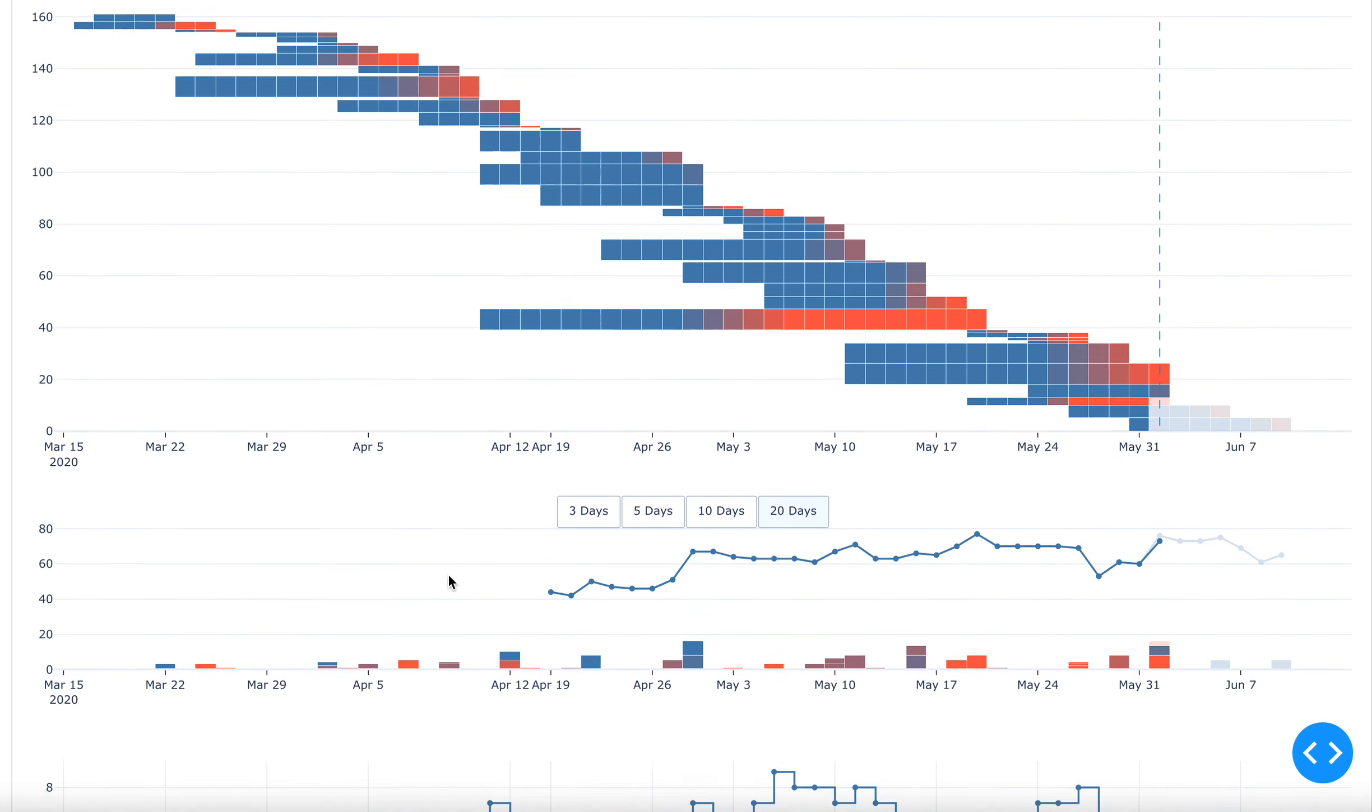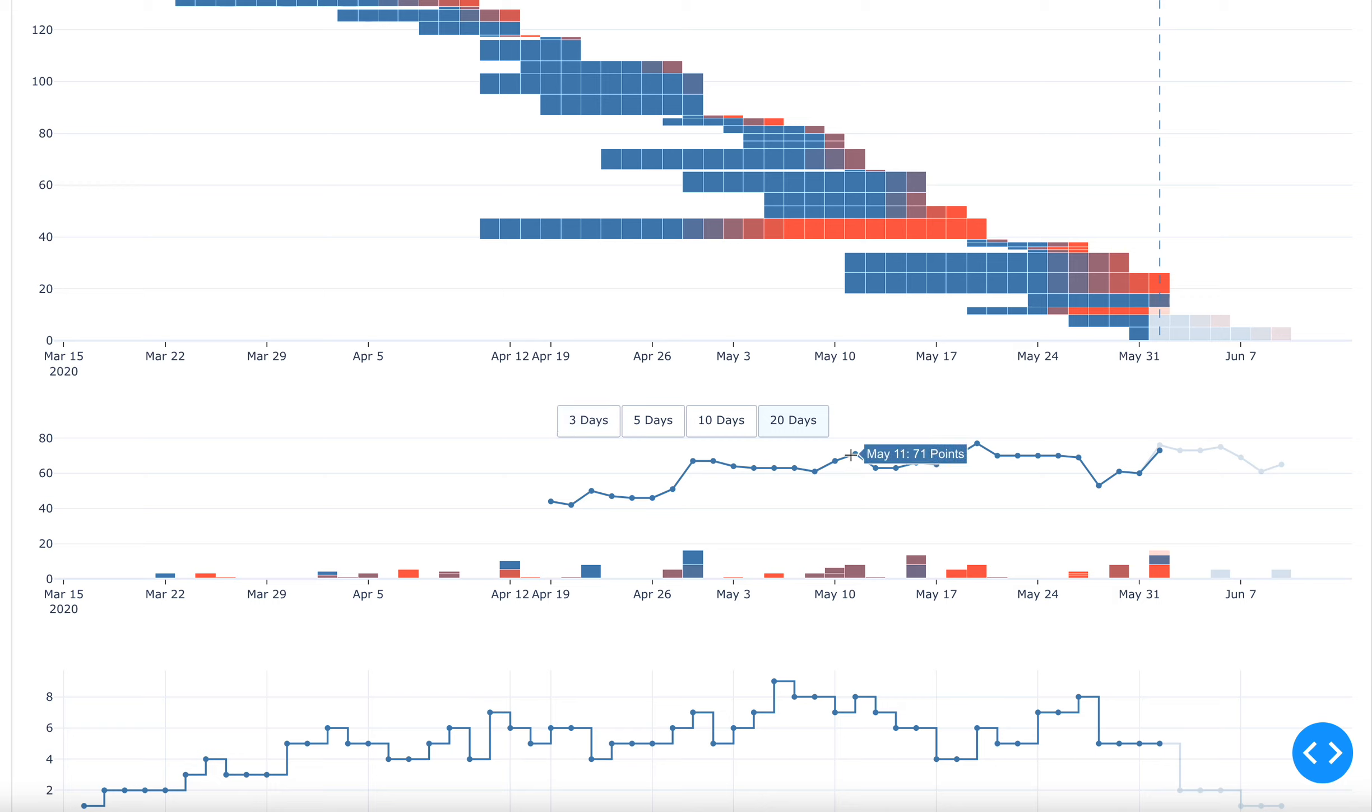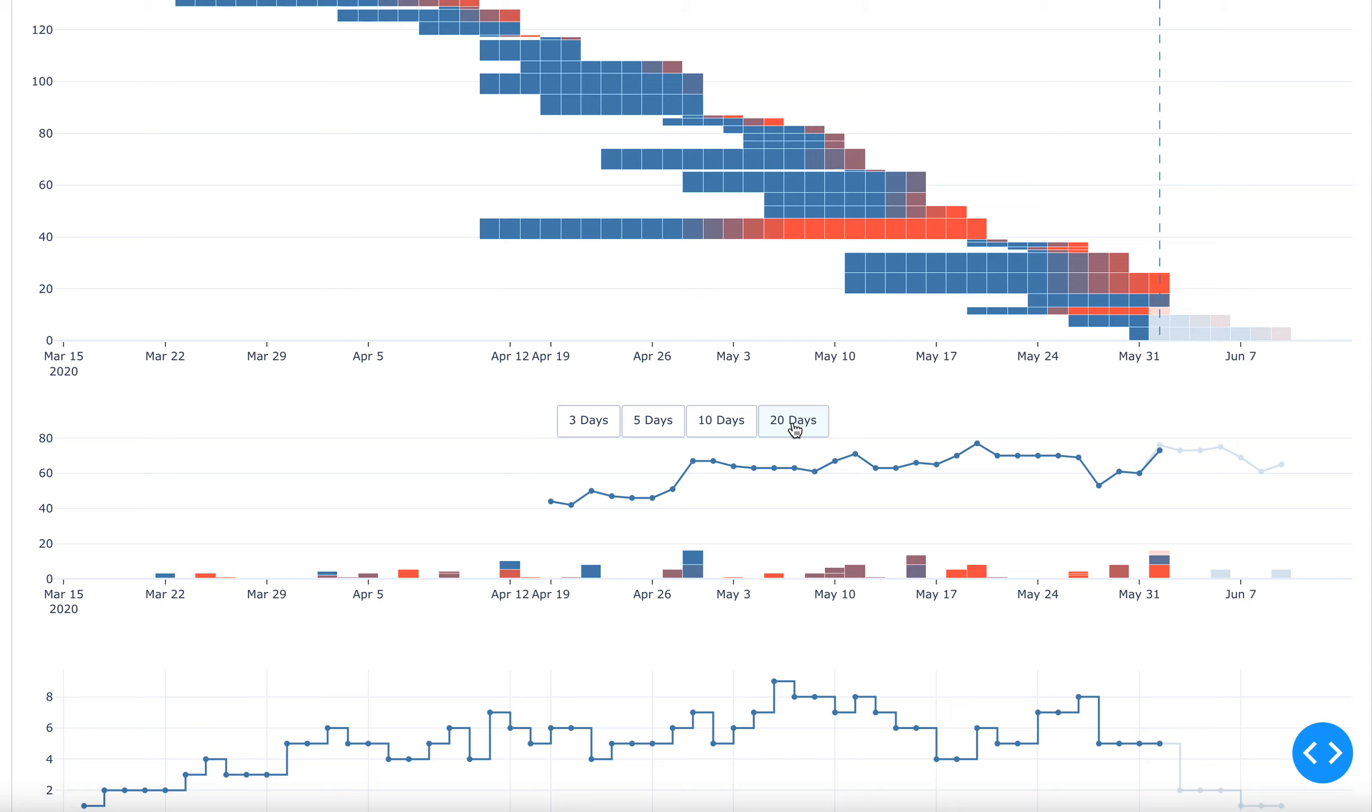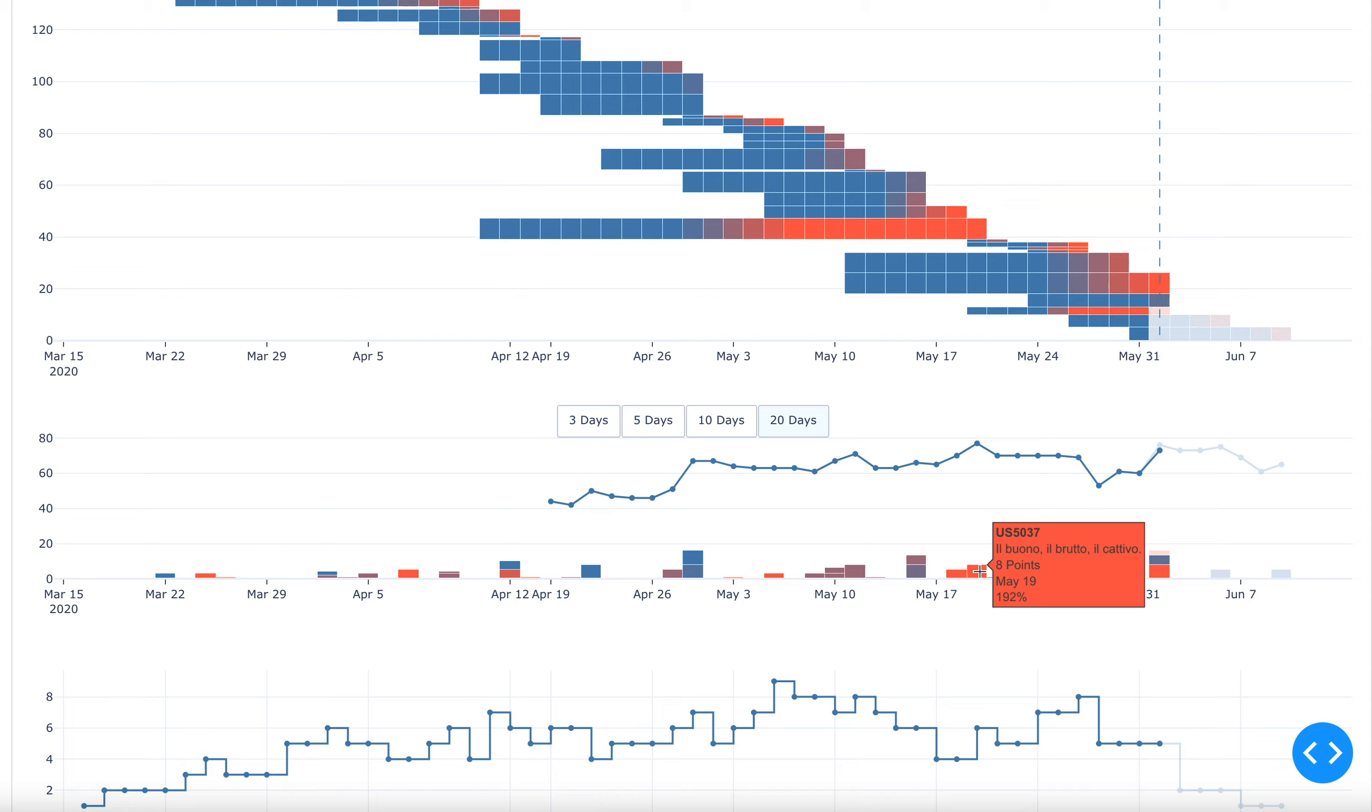What I find even more useful though, on a day to day basis is this graph down here, which is the moving average throughput. So how many story points are delivered in a given time window? Like for example, here, we're looking at a 20 day time window and on May 11th in the last 20 work days, 71 points were delivered. It also shows you here how stories are dropping and it uses the same coloring scheme as above.